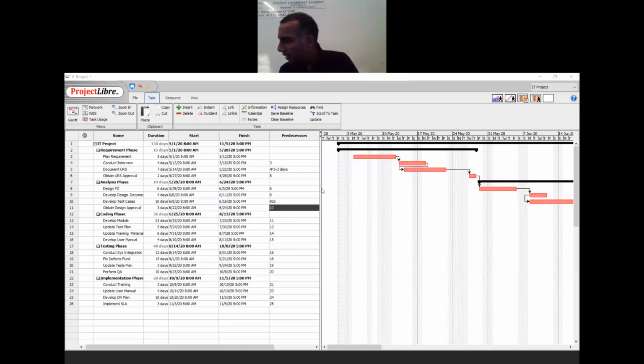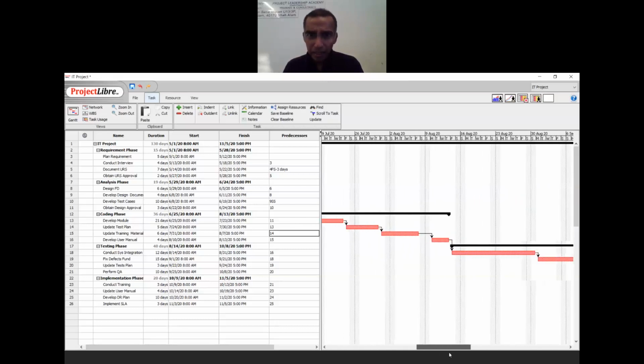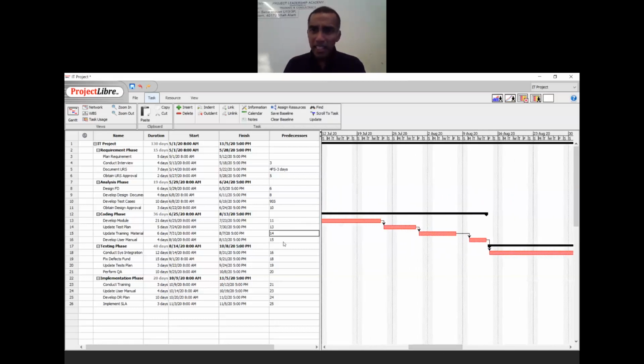Alright, so next one, update training materials, which is in line number 15. Now here's the condition I would like to have. I want this to start halfway through number 14. So when 14 is 50% done, I want number 15 to start. So you can also use these kinds of parameters, by percentage. So you can say 14 fs minus 50%.